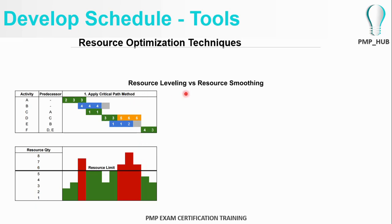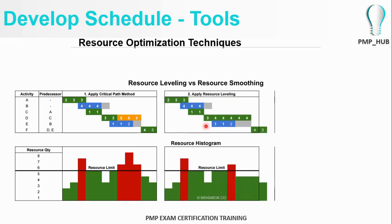Usually we first perform resource leveling and then resource smoothing. Under resource leveling for activity D, you have only four resources at any given time. The periods requiring five, six, and six resources need to be dropped to four. The total is 23 man-months. So we can schedule it as three, four, four, four, four, four, four — keeping four as the maximum. The total remains 23 man-months, equal to the original.